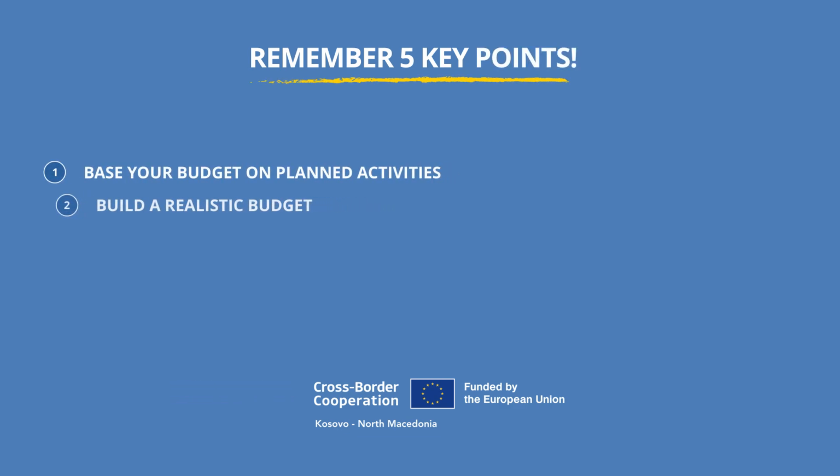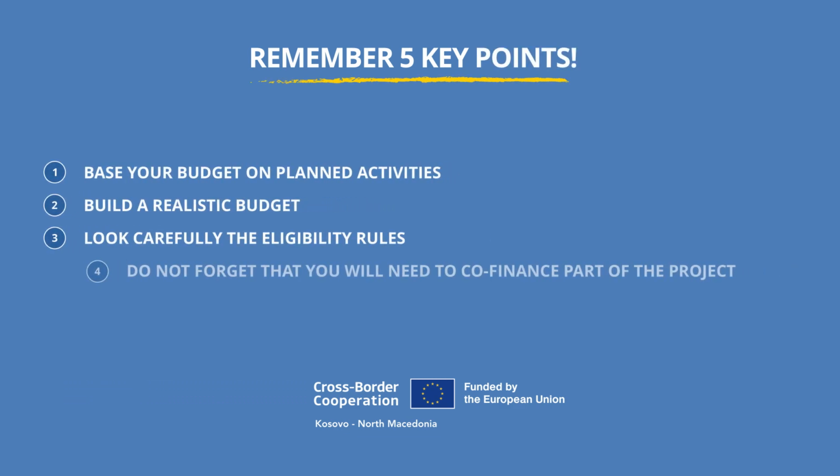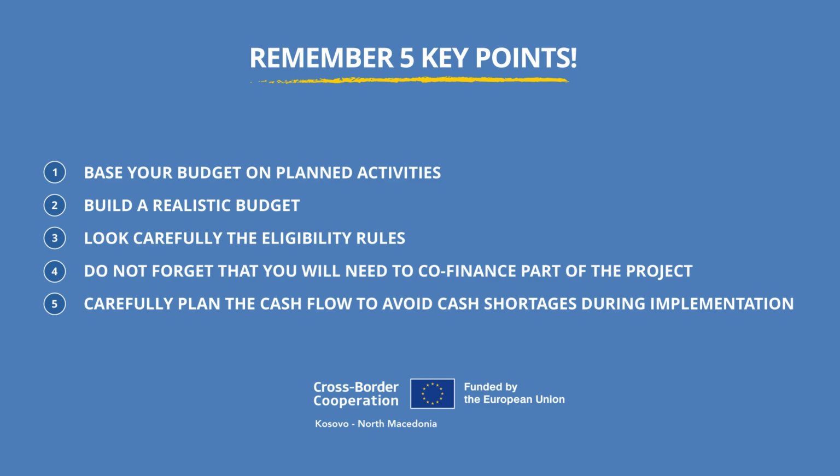Remember 5 key points. 1. Base your budget on planned activities. 2. Build a realistic budget. 3. Look carefully at the eligibility rules. 4. Do not forget that you will need to co-finance part of the project. 5. Carefully plan the cash flow to avoid cash shortages during implementation.